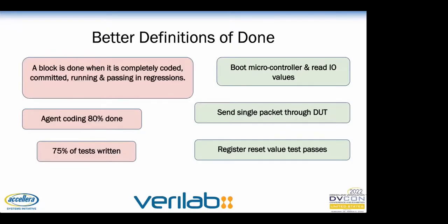It's all too common for teams to come up with some sort of procedural definition of done that involves revision control status and passing tests, and that is the same for all the deliverables. These sorts of definitions don't tell anybody anything about what has been verified when a particular deliverable has been finished. A state can be very hard to nail down and can also be hard for outsiders to really comprehend. Are we partially done in terms of lines of code, of functionality, of calendar time?